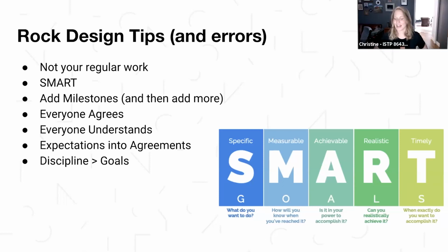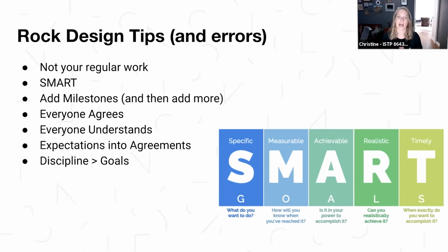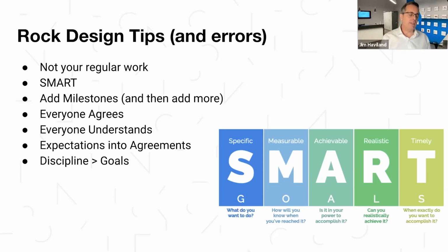Yeah, I think it's good to have those healthy debates and conversations, and I think almost every single one of these really goes into why milestones are so important, because it helps you actually define each one of those SMART items. I mean, especially the timely, because you're putting a literal date on something. Yeah. But the milestones are really like those subtasks, the things that you're saying along the way. Here's what I'm going to do to make sure I actually reach whatever that end goal is. And here's the thing, the exercise of creating milestones always informs your understanding of scope.